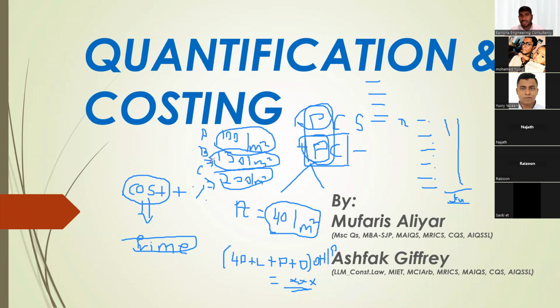So what do we actually do? Let's say we have 9 companies participating in the tender. We make a tender analysis. Then we recommend to the client to shortlist the first 3 or 4 companies, because we cannot work with all 9 companies all the time, as tender evaluation is not an easy process. You have to compare their BOQ, go line by line through the items of each contractor and understand whose price is higher and what the reason is. So it's a long process. So we shortlist the people, let's say to 3 companies.